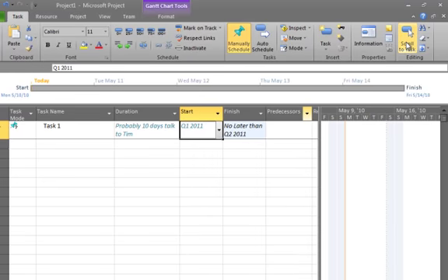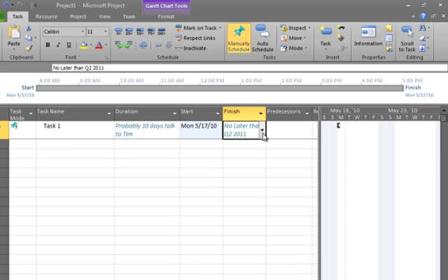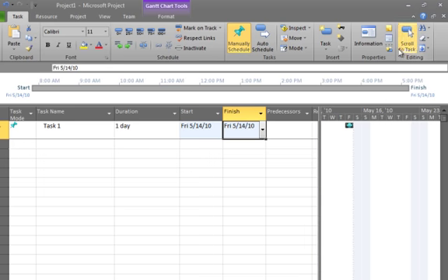As a matter of fact, I'm just going to scroll to that task. You can see that nothing's showing up in the Gantt chart right now. The reason for that is that the Gantt chart does not know what to display because I haven't entered the right level of information yet. It will change the minute I start using dates. You can see the bracket just showed up here showing a start date. Notice that there's no finish date. That's because I have text, I don't have a date in there. Once I set the date, Project will automatically change the Gantt chart to show that information.